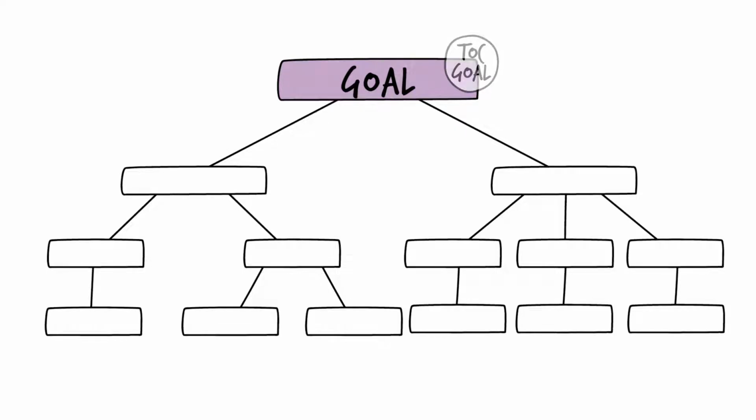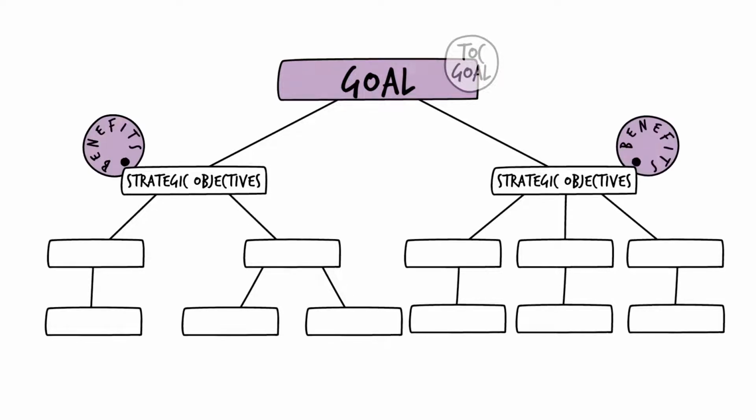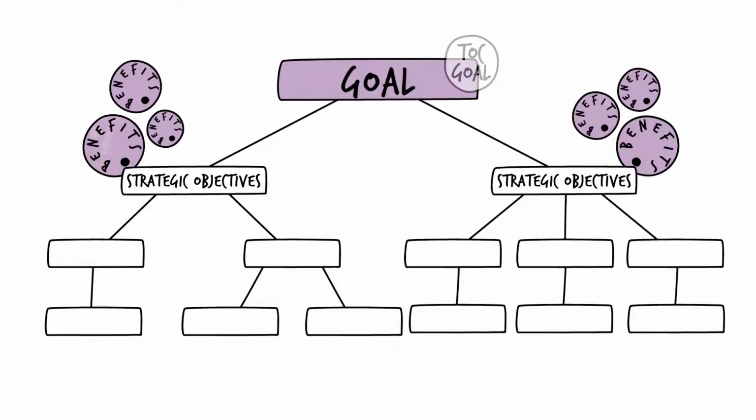Under the long-term goal statement, the results framework presents the strategic objectives, which are the significant benefits to be achieved by the project. The number of strategic objectives should be limited to ensure that the project is focused and not spread too thinly. Regardless of whether there is just one or several, the strategic objective statements should be specific to the project, realistic, time-bound, and measurable.